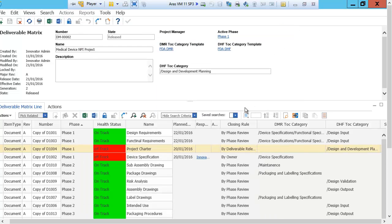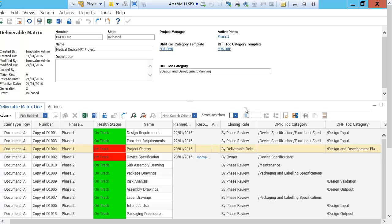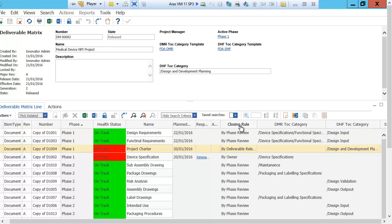The deliverable matrix lists all the work that needs to be done to complete the development process of the device. It contains many different business objects of innovator including requirements, documents, parts, FMEAs, and risk analysis, just to name a few. The deliverable matrix also specifies the closing rule of the deliverable. This is what tells the system that the deliverable is finished, and when finished, the deliverable is placed in the specified location in the DHF and/or DMR.